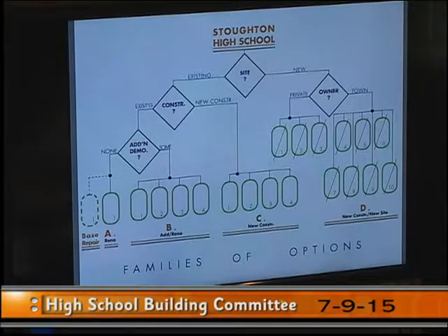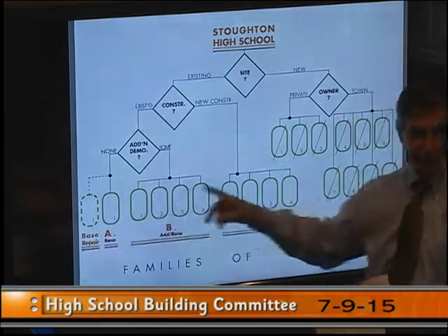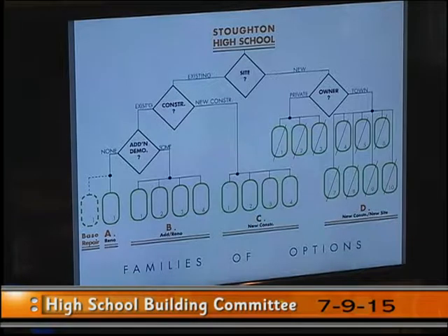Yes, they do have monies to do roofs, they do have monies to do boilers, but there may be a lot more involved. And also, they make a judgment that if you're truly extending the longevity of a deserving educational facility, then yes, you'll qualify. But they're not going to spend good money after bad. If the school's not worth investing in, then you won't qualify for that reimbursement for the boilers, roof, windows, and so forth. And so that really opens eyes when you realize that you might have to foot the bill for this 100% yourself if you don't approve one of these other new ones where you do get some reimbursement. And that, again, is an equation that people often want to see and understand in cases like this.